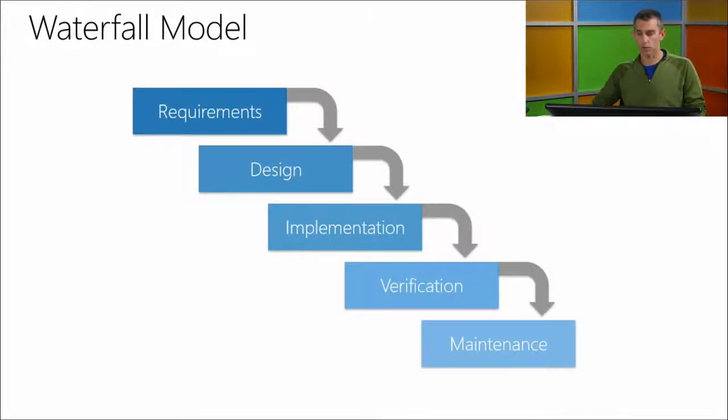And you've got your exit criteria out of this phase. We'll talk about this a little later when we're talking about the exit criteria for tests. An example is that a certain percentage of your test cases will be run. This is all going to be laid out in your test plan. A certain percent or certain criteria will be met that you've agreed upon about what kind of bugs you're going to allow out of this phase and into production. If you've got severity 4 bugs that you're not concerned with, you probably agreed that it's okay to let some of these through.